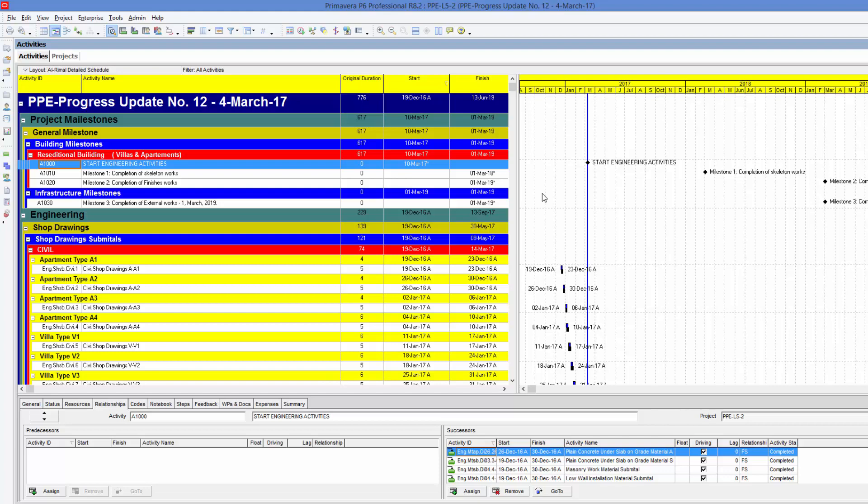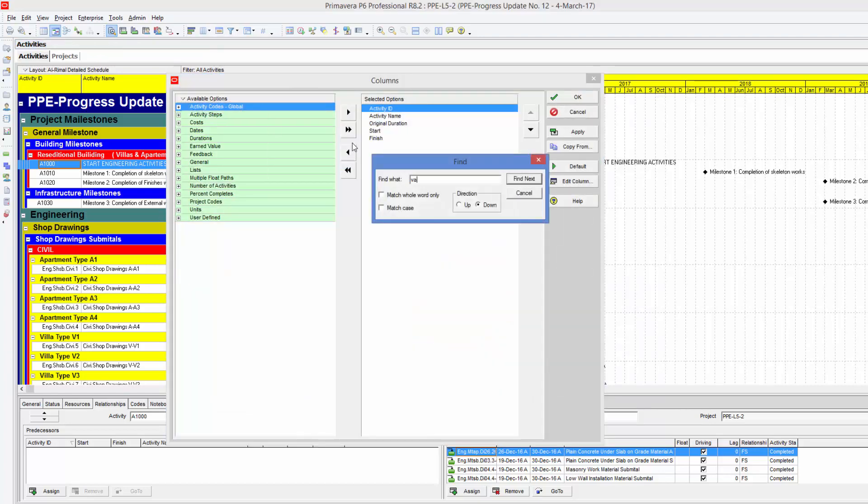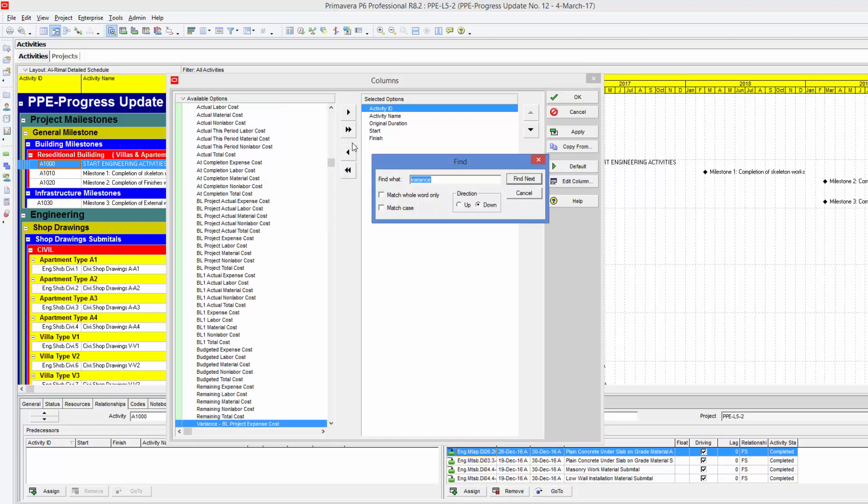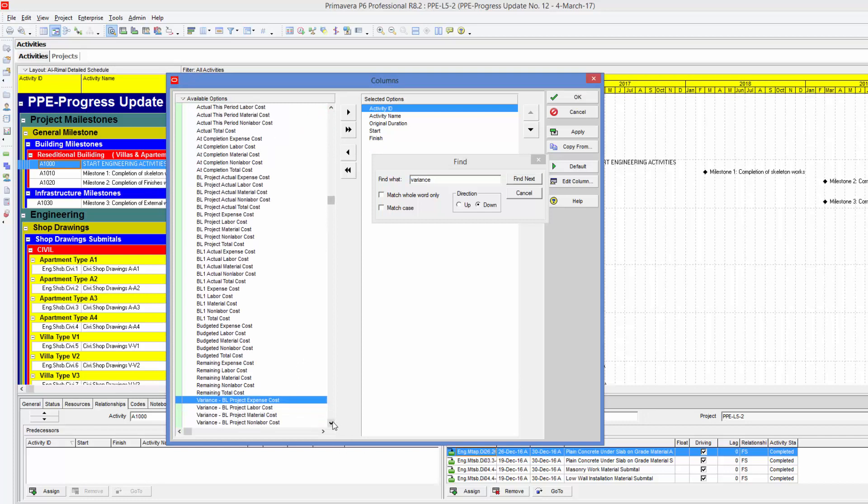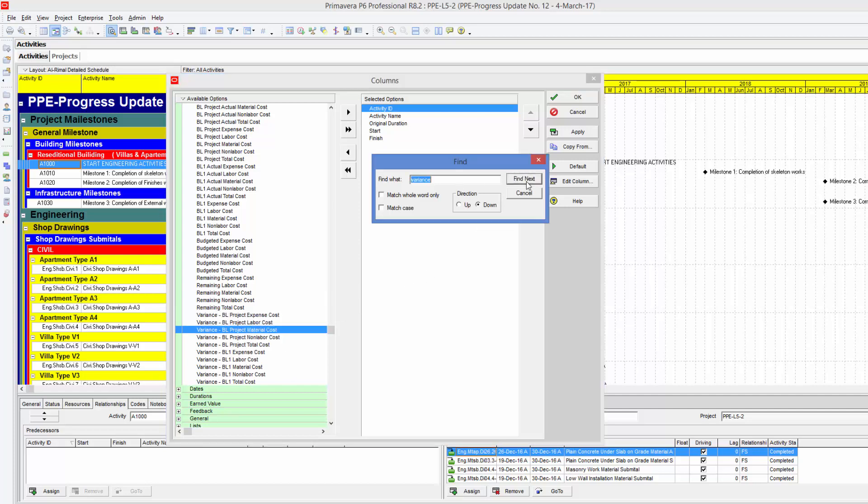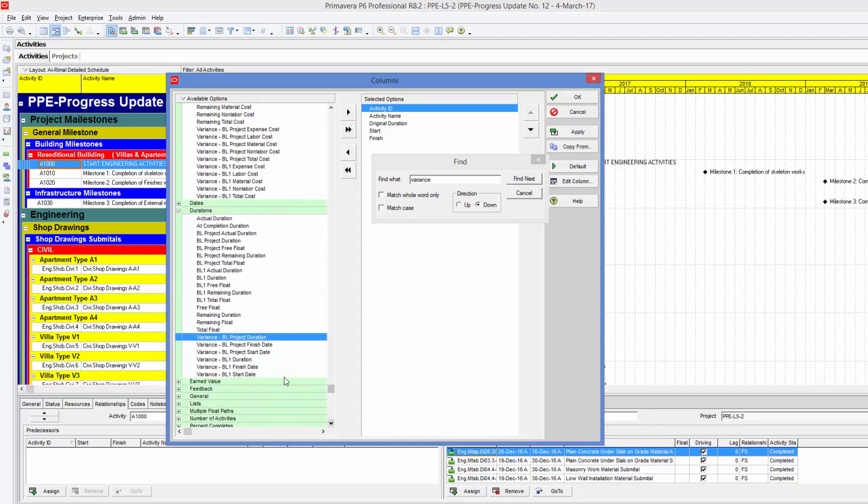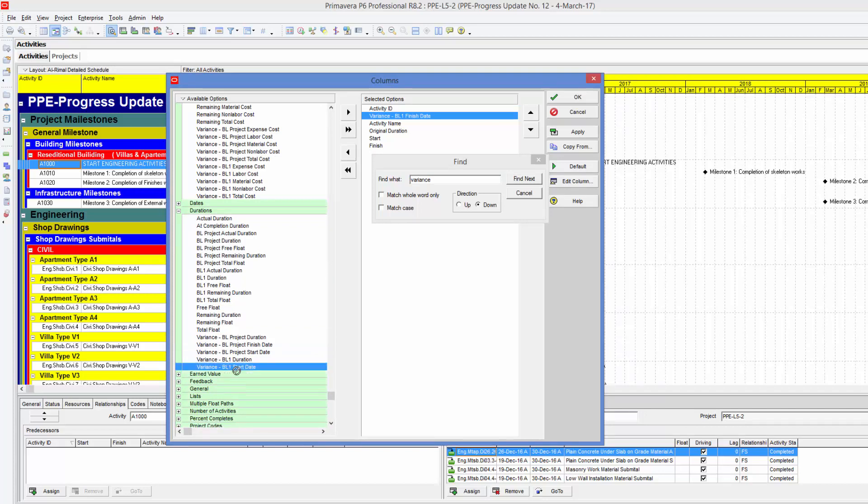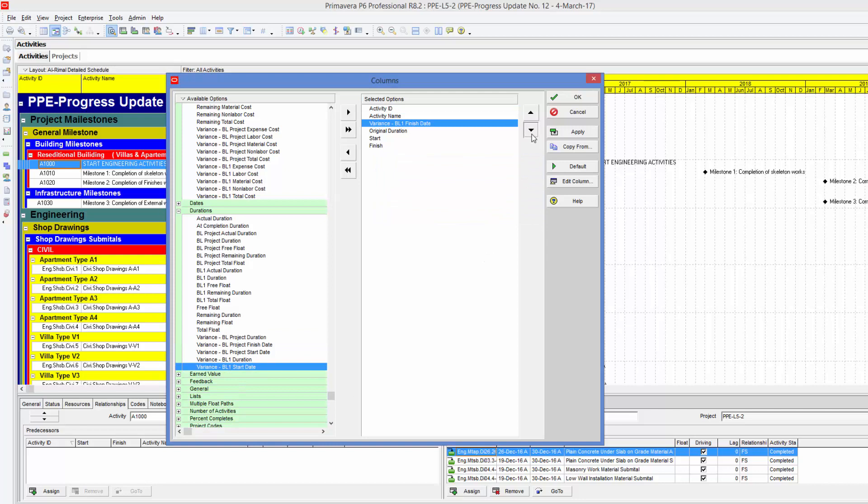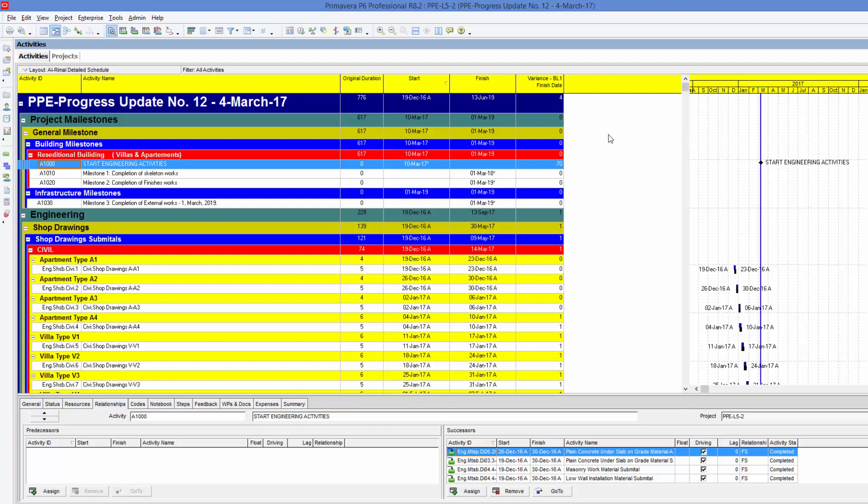Now we are going to look for the criteria. You can use whatever criteria you want. However, I'm suggesting to use the variance of the planned finish from the baseline, which will show me, I'm going to use variance BL1 finish date. So I need to search for it where it is. It should be in the dates. So variance BL1, it means baseline 1 finish date. This is a very good indicator for me. You can use whatever you want. You can use float, total float column also. This could work. But I'm telling you the concept and you can apply it as you want. So here is a column. It shows for you the differences between the planned and the forecast finish date for each activity.